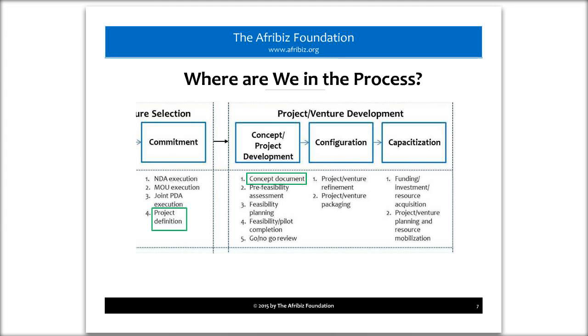Now, again, remember I told you, in terms of when you can define your idea as a project, the first thing is having a site. If you don't have a site, almost everyone will tell you you don't have a project. So that is one of the key priorities you have to look at: how to get that. The reason I say this is that I'm working with several groups of people who want to develop projects in Africa. Many of them are diaspora, living in the United States or Europe, and they have an idea and the connections locally.